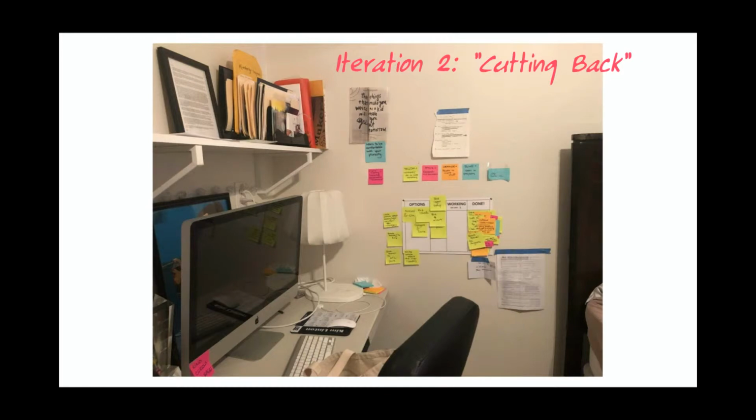So far, so good. Also, I introduced a WIP limit this time, and I started with 2. My thought was, in the working column, if I have 2 things going on at once and one of them is blocked, then I'll have an option to work on the other thing and not be tempted to go choose something else like I had done in the past.